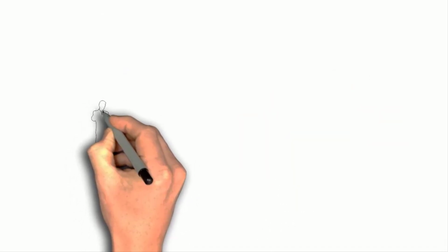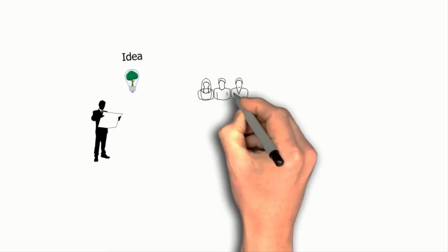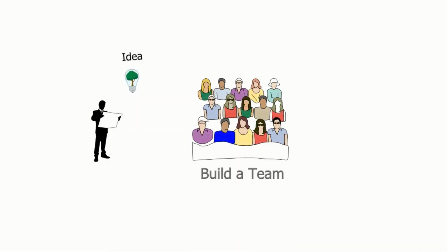Any individual who comes up with a good idea is free to assemble a team and act as a project leader. Each project then has to compete with all other projects. So this gives power to individual workers. Now it's an employee's job to either find something useful to do by joining an existing project or to start a completely new one by themselves. So they enjoy lots of freedom in the process and don't have to worry much about resource planning, as long as the deadlines are respected.